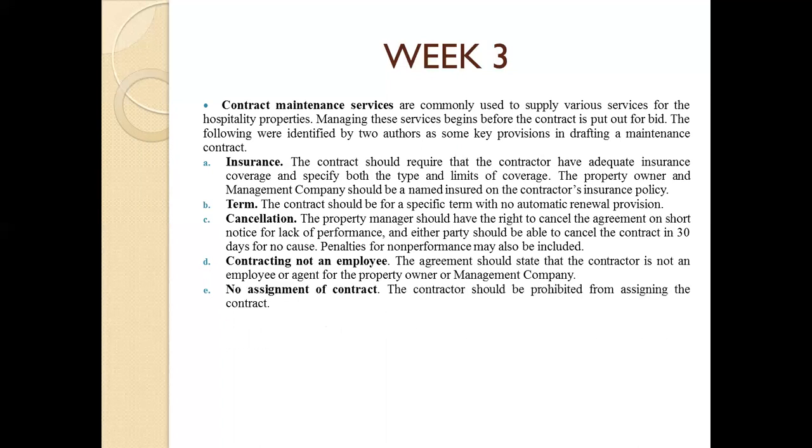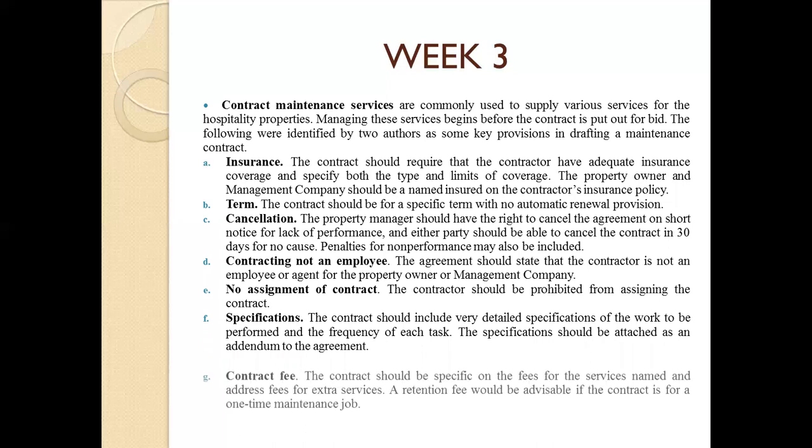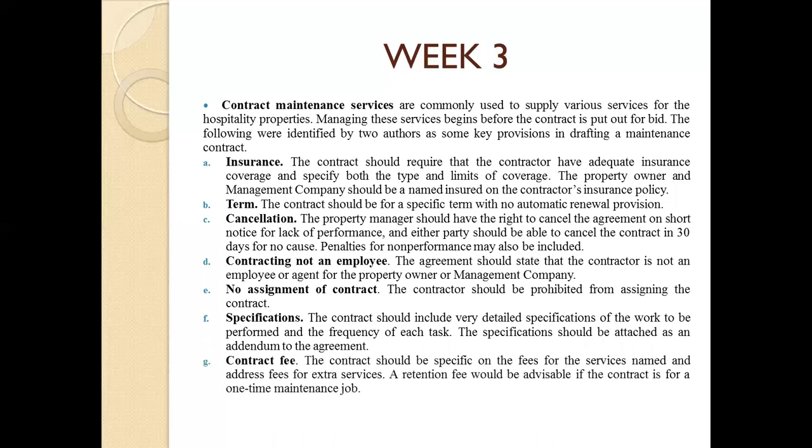No assignment of contracts. The contract should prohibit the contractor from assigning the contract. Specifications. The contract should include a very detailed specification of work to be performed and the frequency of each task. The specification should be attached as an addendum to the agreement. So, dapat makita lang kung ano yung talagang allowed nilang pwedeng gawin.